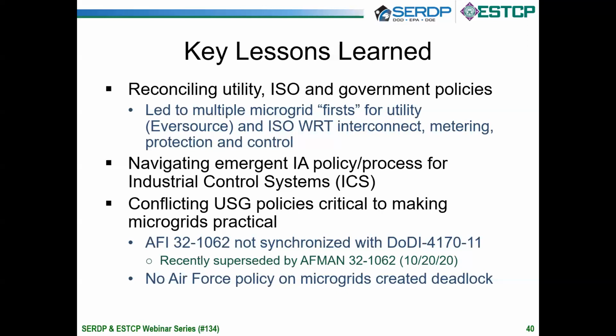But the design has already been vetted, and we feel comfortable that it should be able to pass muster once we get to that point. And another key issue for us that really was our biggest holdback is the government policy aspect. So there was an Air Force instruction that we confronted early in the program and thought we had kind of put behind us, that basically said that you cannot use standby generators attached to critical loads for anything other than that attached critical load.